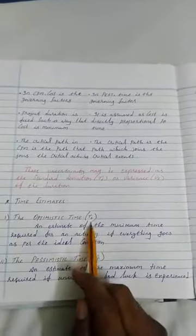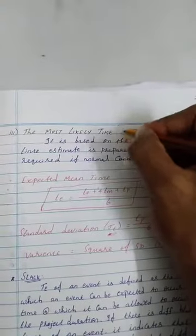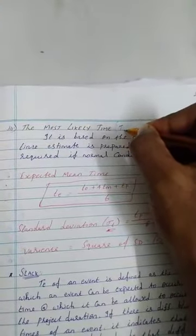It is having three different times there. The optimistic time, which is normally called as T0. The pessimistic time, which is normally called as TP. And most likelihood time, this is called as TM, most likely time.